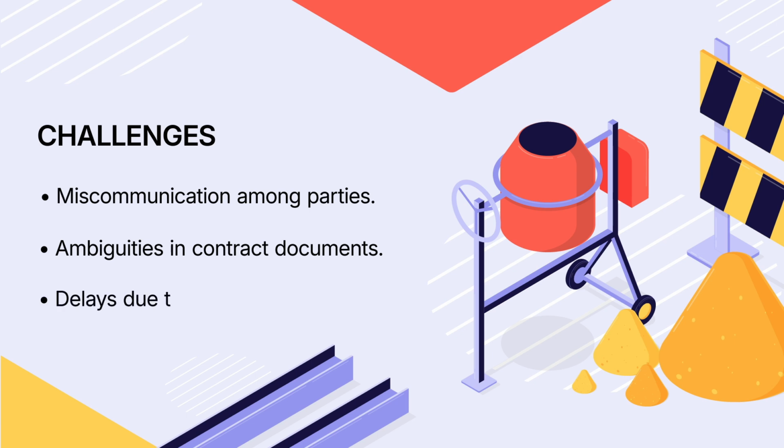There are also delays due to unforeseen conditions. Those unforeseen conditions can be that you're excavating the site, and it happens that some bones are found. So when that happens, construction has to be stopped and people need to figure out what's the next step. We'll talk more about that later on in the course. Addressing some of those issues proactively can make the project more successful.